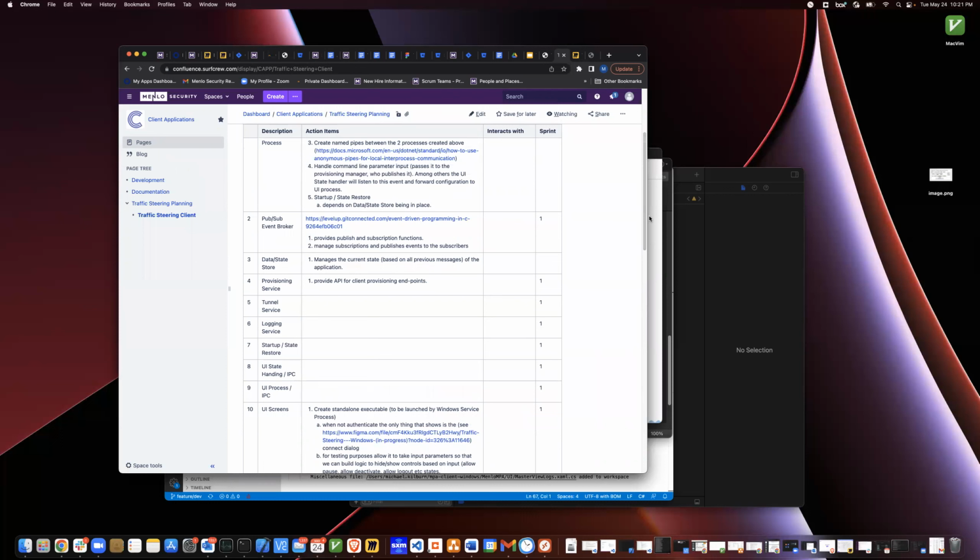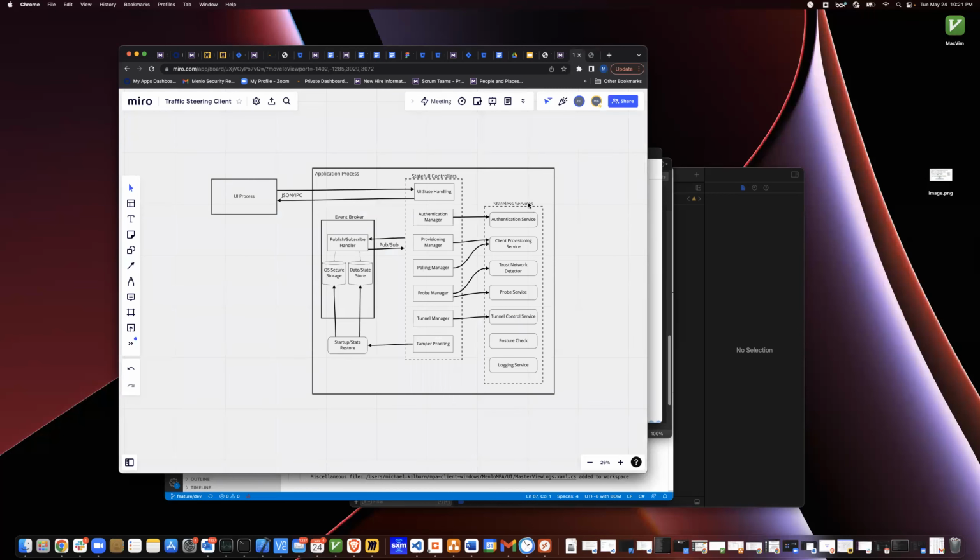And investigate this problem of fixtures we're going to need, because we don't have servers, so that we can at least get an idea of how long everything's going to take. But code up as much as can be done on this side using fixtures. I think that's how we're going to have to go.